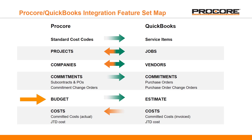The same workflow applies to project budgets. Budgets for synced projects can be entered using the Procore budget tool, then synced to QuickBooks where the information is used to create the estimate for the project. Once the budget has been synced with QuickBooks, you can start taking advantage of what many consider to be the biggest benefit of the integration, which is the retrieval and display of cost information being entered on a daily basis for these jobs in QuickBooks. For each of your integrated projects, your project managers will be able to see their direct and job-to-date costs by cost code in the Procore budget tool, giving them more visibility into actual cost versus estimated cost, without having to request any information from your accounting team.